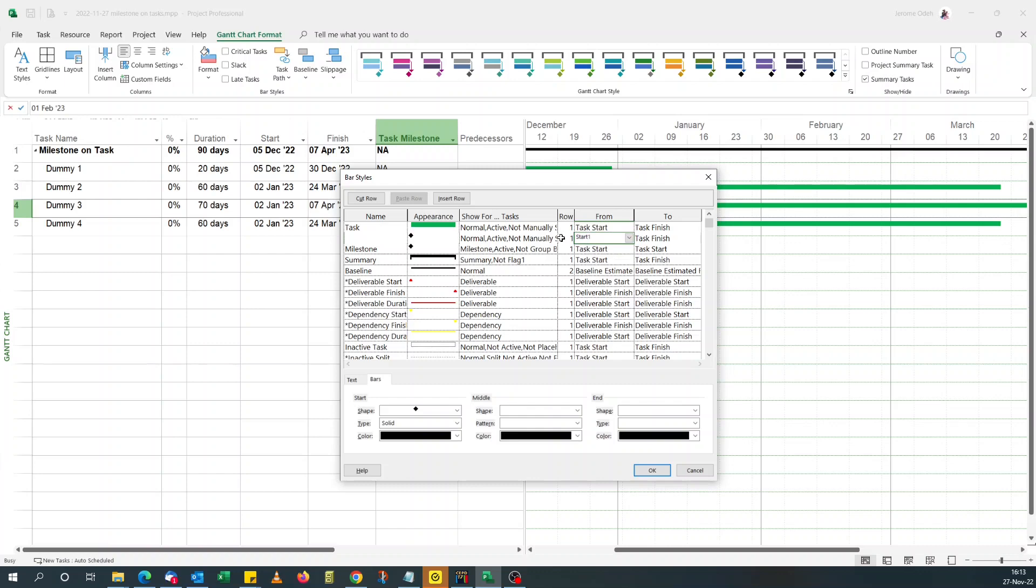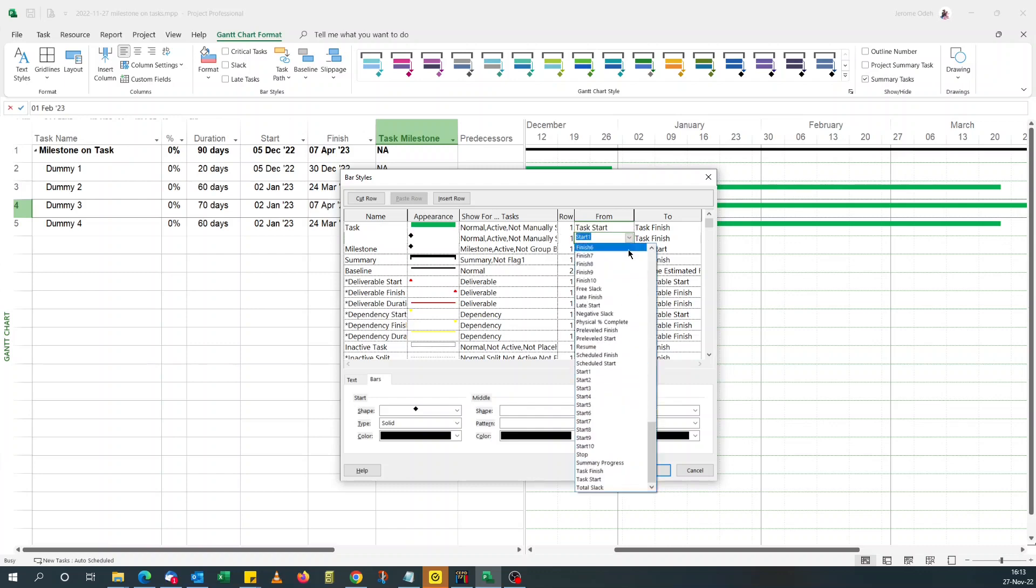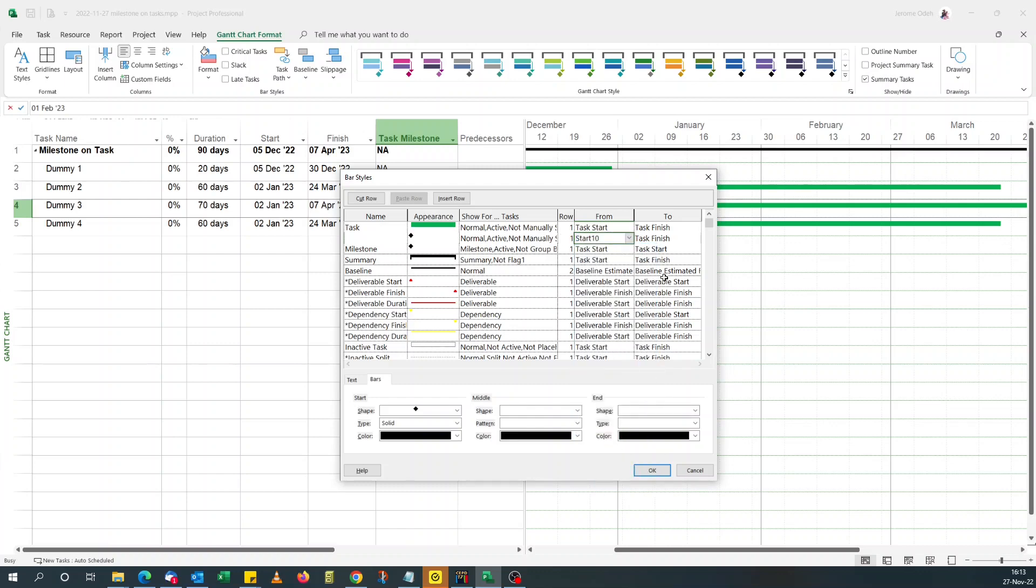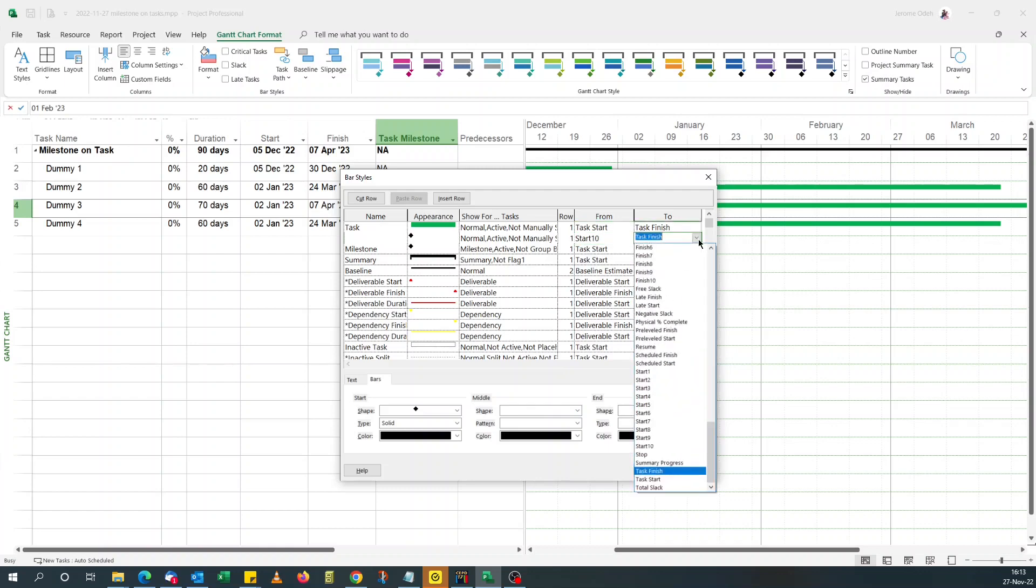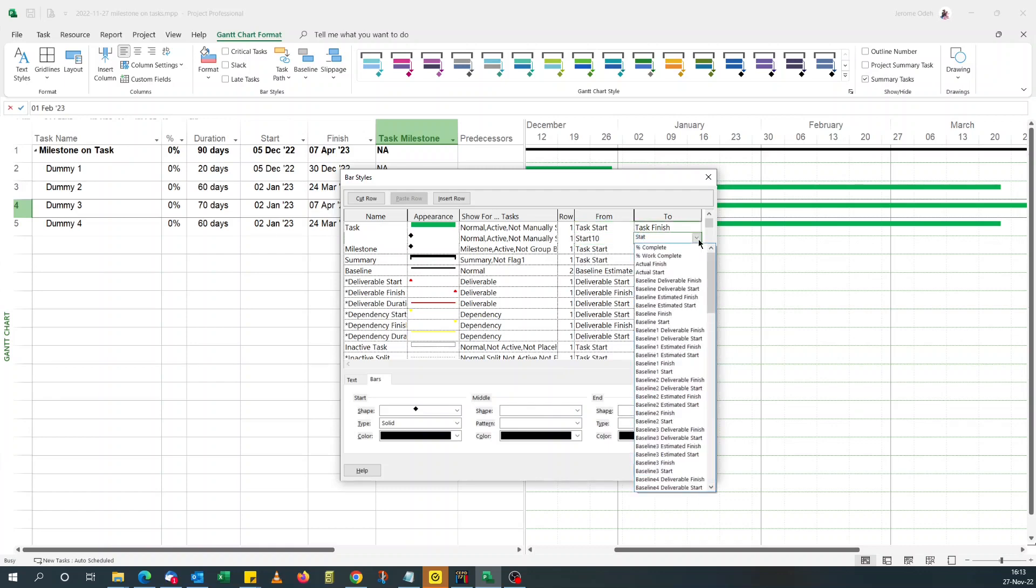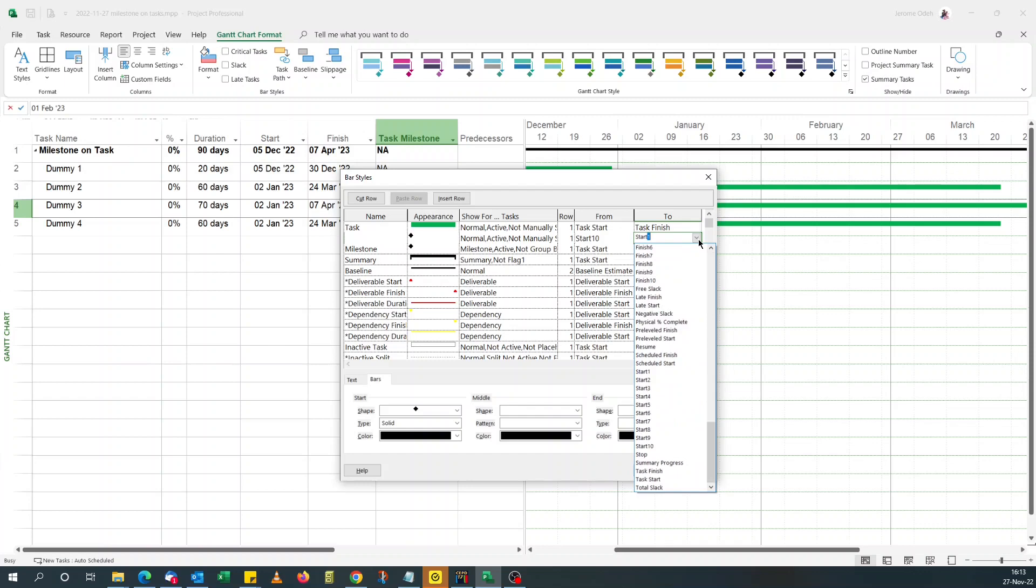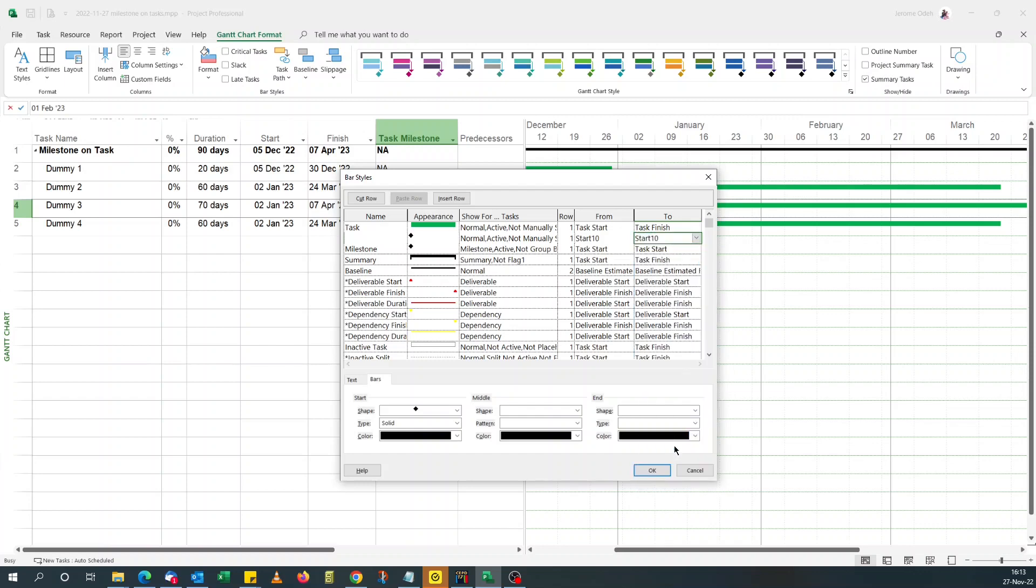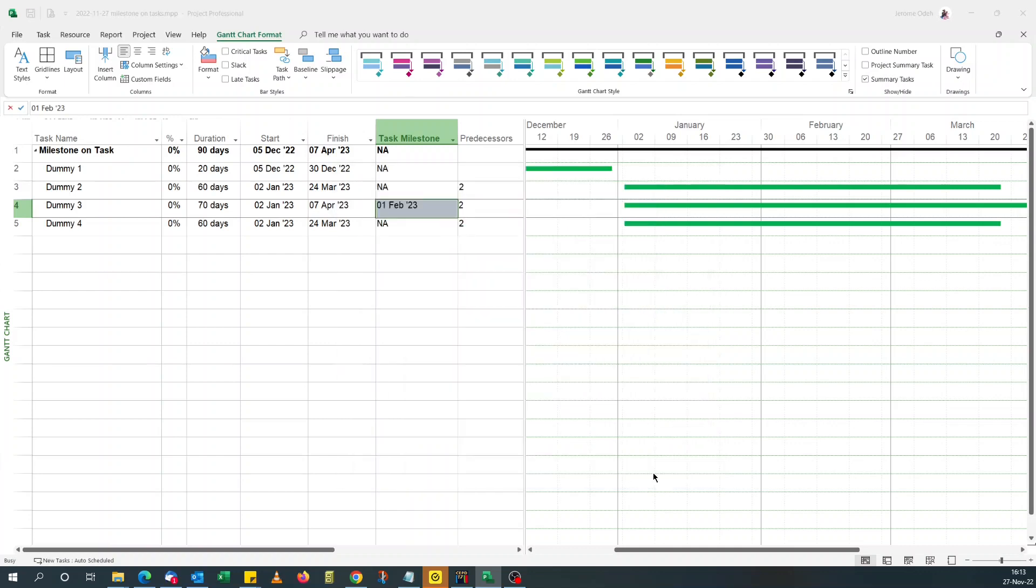start 10, from start 10 to start 10. Yep. Okay. And you click okay. Voila. That's our milestone there. The 1st of February.